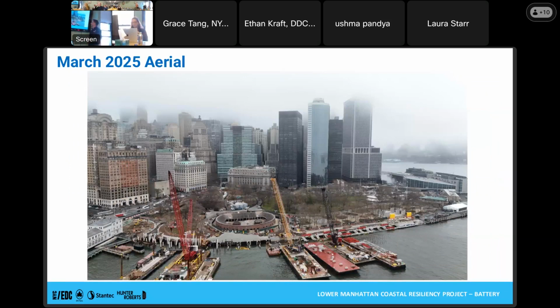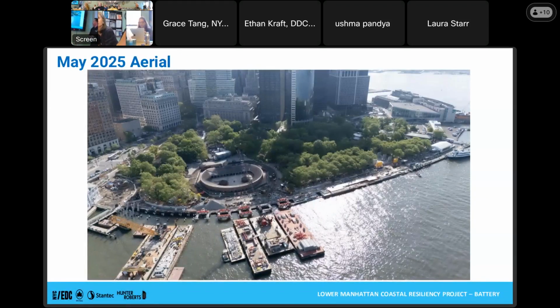We're not shy. As I mentioned, when we offloaded all that soil and fill, we were able to bring in all the foam glass. That's a mountain of foam glass aggregate over here, really showing the progression we have going from East Coast Memorial down. We have piles going on, pile caps, over to beams, again towards planks. And this is back in March. Again, by the number of cranes we have on site, now we're down to 2. So this is what you'll see on a daily basis outside for us.